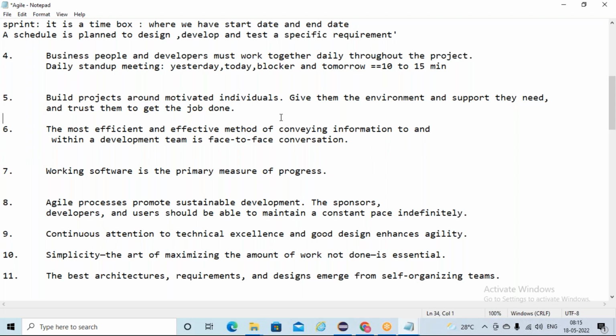My own decision is not final here. We will take all the team members' inputs, and based on that we'll decide some timeline, and within that timeline they are going to do the work. That is estimation. Story points are nothing but estimations: for every user story, we estimate how much time it is going to take. How are we estimating? One person is not estimating. We interact with the development team and ask how much time they want. We interact with the testing team and ask how much time they want. Altogether, the time fixed for that particular user story will be finalized. That is how it goes. Got the point now?